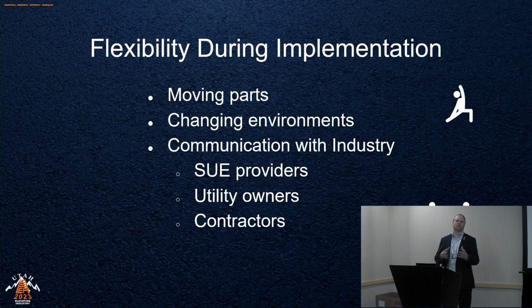There's no central repository for that information. So another component of the RULIS project is developing that repository, where a district gets a SUE done on a project, and a deliverable from that SUE will be an upload of a file to the RULIS system. So we'll start gaining some traction on keeping track of the information that we're paying $70 million a year for.